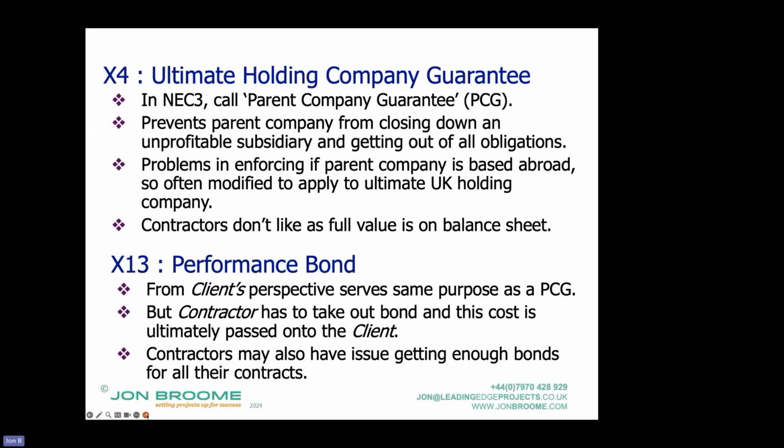But financial companies don't just give out bonds, a form of insurance, for free. They charge, and ultimately that charge is going to be included in the prices somewhere. So the client is ultimately going to pay for this additional cost.